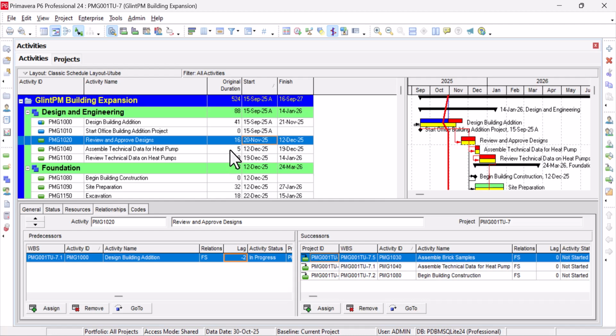And it's better than constraint, because constraint affects your critical path. Some of those activities might be delayed, but you will not know, because you have already forced that date. So you'll not be able to properly track delayed activities or your progress. So avoid constraint if you can, unless it's an agreement with the team.